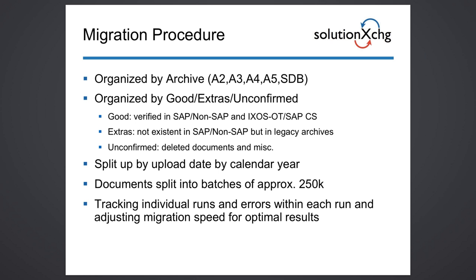Believe me, we've dealt with archives that have been in operation for 20 plus years, and there's a lot that can happen in 20 plus years. Therefore careful analysis up front really pays off and gives you a good idea what to expect, and you're much more prepared to work through specific situations rather than going into panic mode when you realize that certain documents are not retrievable. If you do your analysis beforehand, you clearly understand what to expect, which documents you will find, and which documents will create an error in the attempt to migrate. And so that's what we did.